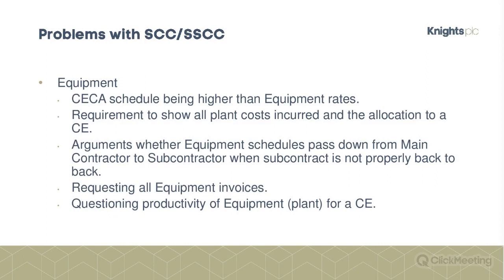Equipment, which rates do you use? And I suppose that's just down to negotiation, because once it's in the contract data part 2, it's in, it's agreed, but make sure you get something in and make sure it's agreed and it gets into the contract data part 2. And again, it's all about proving the cost, but also proving the allocation of that piece of equipment to a particular task on site.